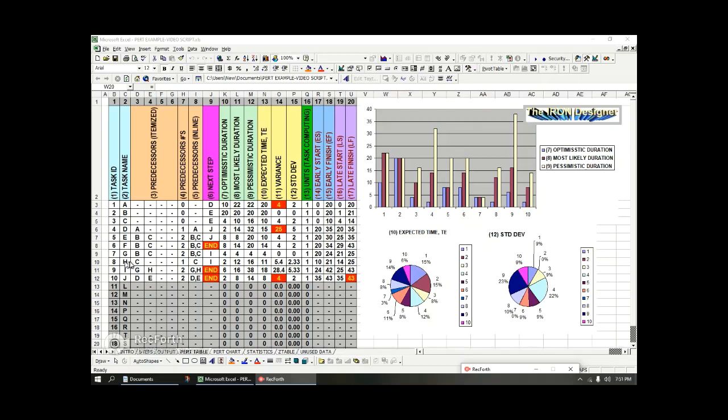Now H only needs for C to get completed, okay? You never know, just because they're labeled A, B, C, D, and letter C might actually finish quicker than B. We'll have to see what the times are over here. But there's a possibility in your project that C could complete before B. So here C needs to be done, and the next day H can begin right after C is done.